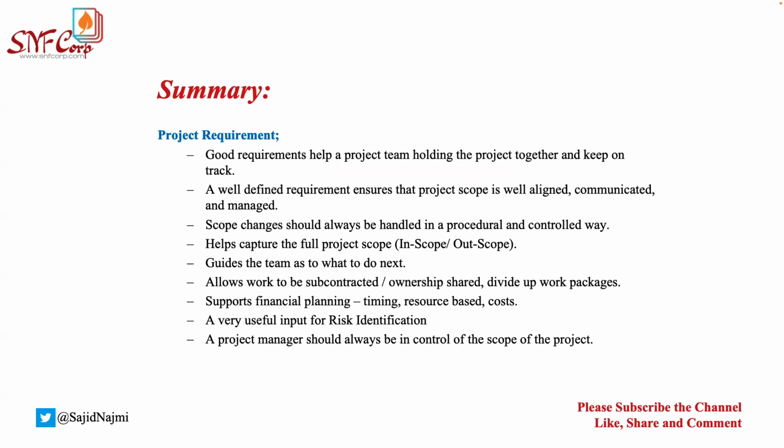A well-defined requirement ensures the project scope is well aligned. Obviously, with a well-defined requirement, you have understood the requirement correctly, analyzed it, and defined it clearly. This should definitely be aligned to the scope of the project, and then only will you be able to communicate and manage things well. Right, so this is very important. Scope change should always be handled through the organizational change procedures that we just spoke about. You should not be accepting or rejecting any of the change requests on the fly.